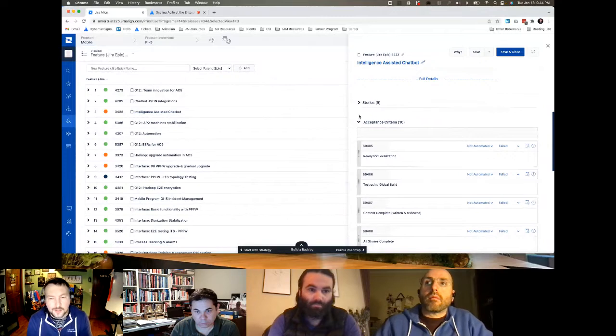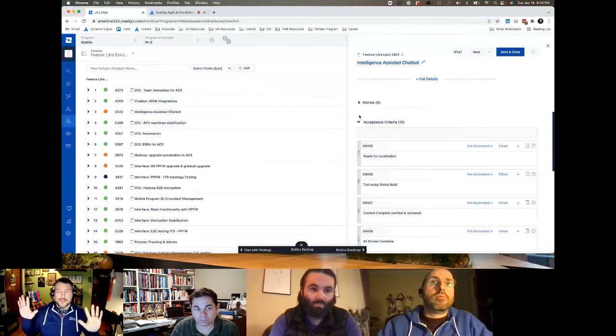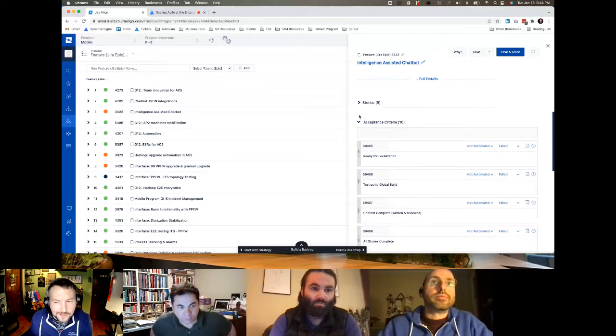Jira Align uses a really neat ability to set individual acceptance criteria that a product manager can fail or pass. When I step back and ask, is this feature done? I can determine not just based on the stories being done. If it's done, I can actually use my own acceptance criteria to say what's good, right and what's not right.